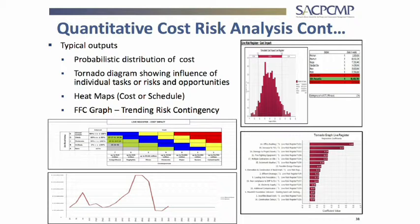We also do an FFC risk contingency graph. The blue lines show the baseline contingency — say 50 million — at project start. Any risk that materializes results in a drawdown from that 50 million. We keep trending our exposure every month or at each risk workshop. If you go to a board meeting and your risk is 300 million against 50 million contingency, that's a 250 million exposure.